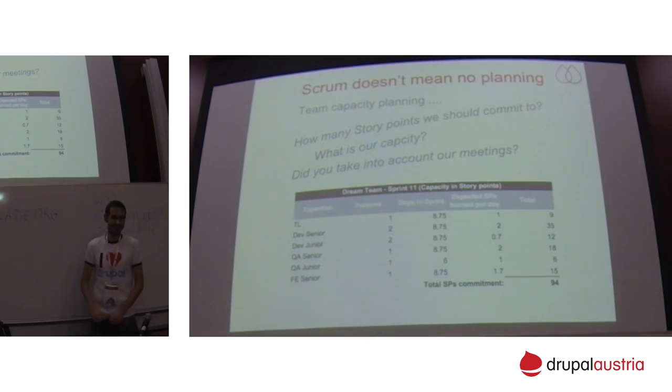Yeah, a good question. So you're putting that number on the table, and of course you might justify it by saying, all right guys, let's discuss how many user stories and what total amount of story points we can deliver in this sprint, because I believe that based on the historical data and your capacity, we're going to be able to deliver that. And I have lived both scenarios. In some situations the team might say, yeah, let's deliver even more, let's increase by 20%.